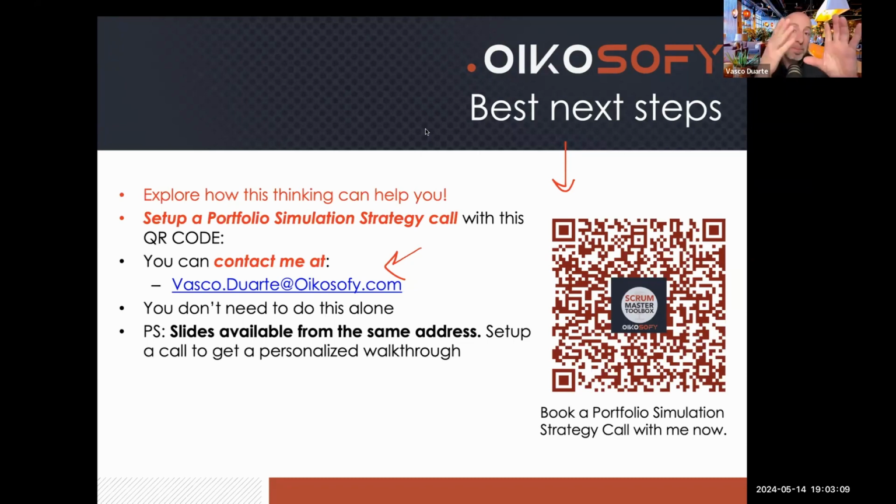This is very important, this updating the beliefs, right? Because one month later you have more information. There are different things you believe in now. And updating the beliefs allows us to start using Monte Carlo simulation, using Bayesian logic and Bayesian thinking. We start understanding, okay, so if these beliefs change, how does that affect the prior? So the probability of certain outcomes has changed. Let's run the simulation and see what is the likelihood of outcome. So it really starts from that very simple thinking of, okay, so what do I expect if I do this today will happen tomorrow or within a week, right? That's how the thinking starts.